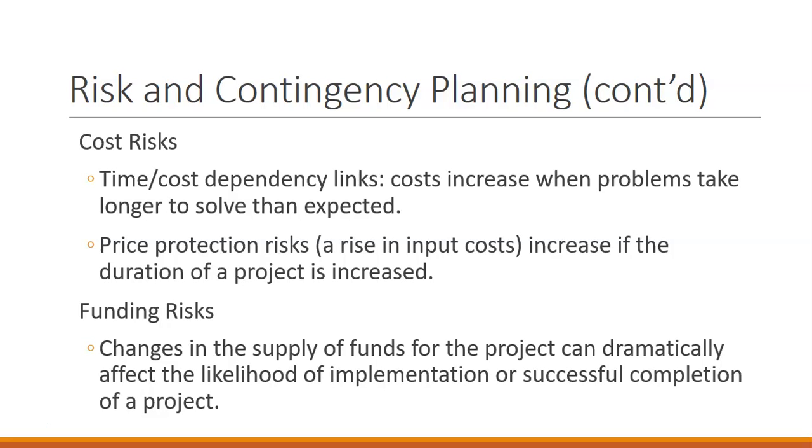Then we have cost and funding risks. So what are the different cost risks? Are prices going to go up? As the duration of the project increases, the likelihood that the prices are going to go up also increases. It's harder to control costs over a very long project.